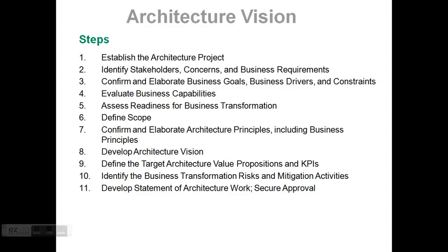It's basically based on the purpose, focus, scope, and constraints. Determine which architecture domains should be developed, to what level of detail, and what architecture views should be built. Assess the resource requirements and availability to perform the work.